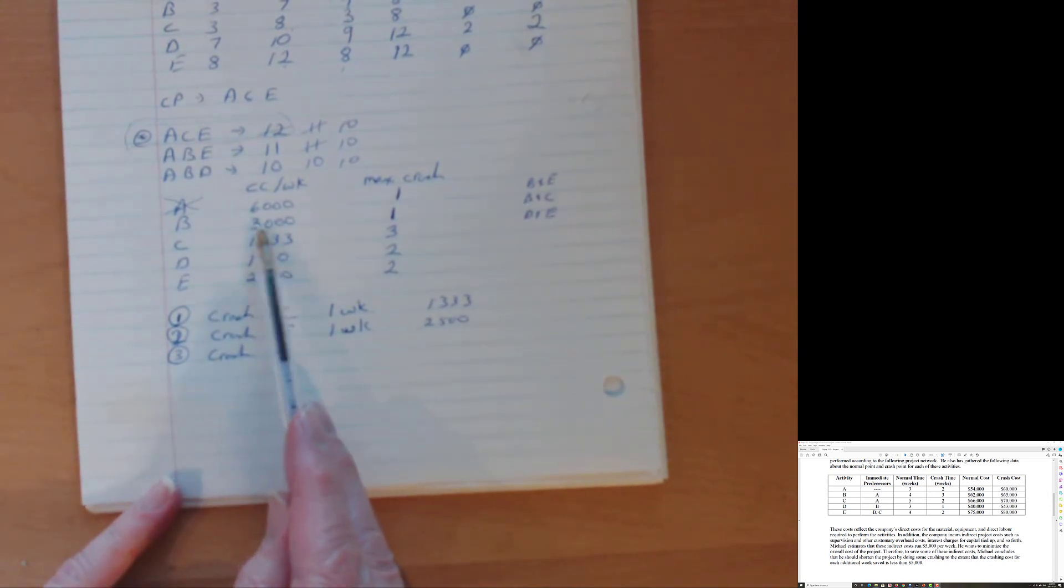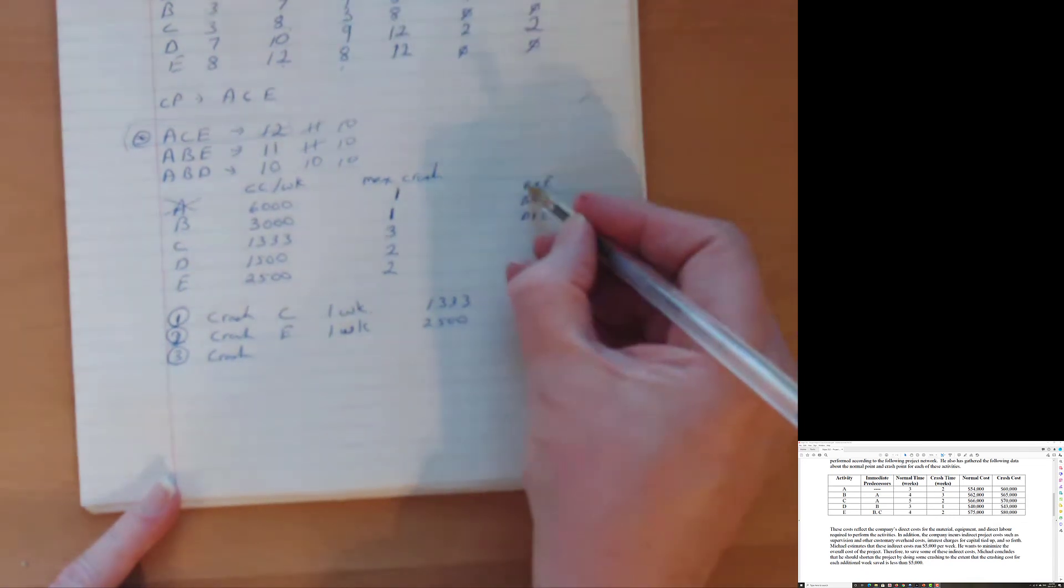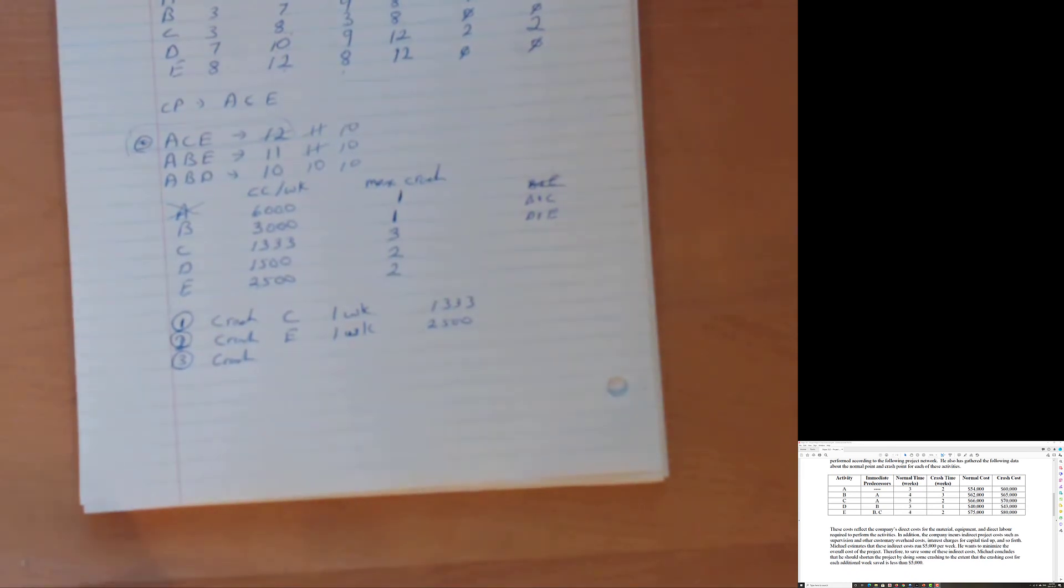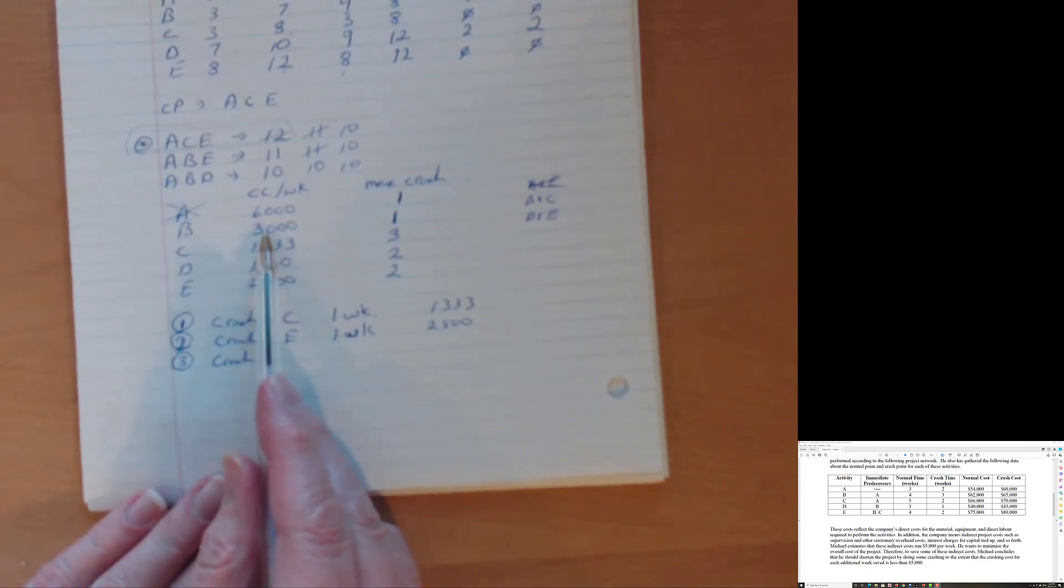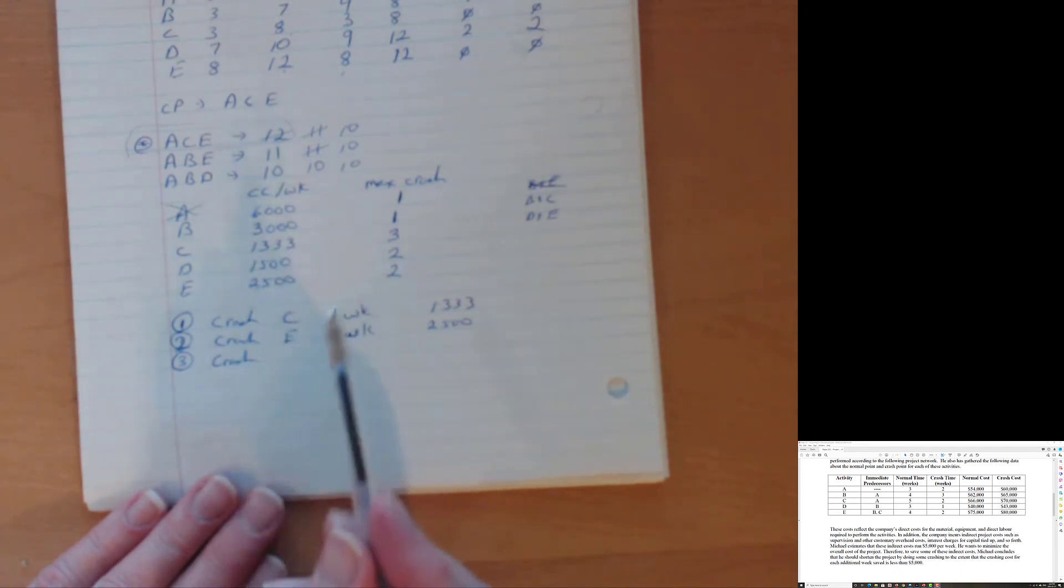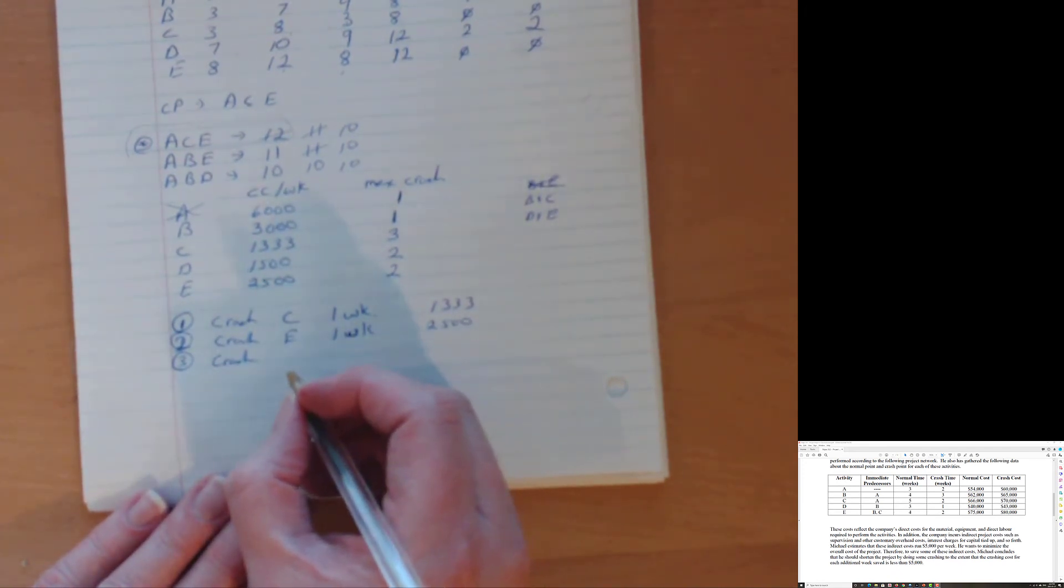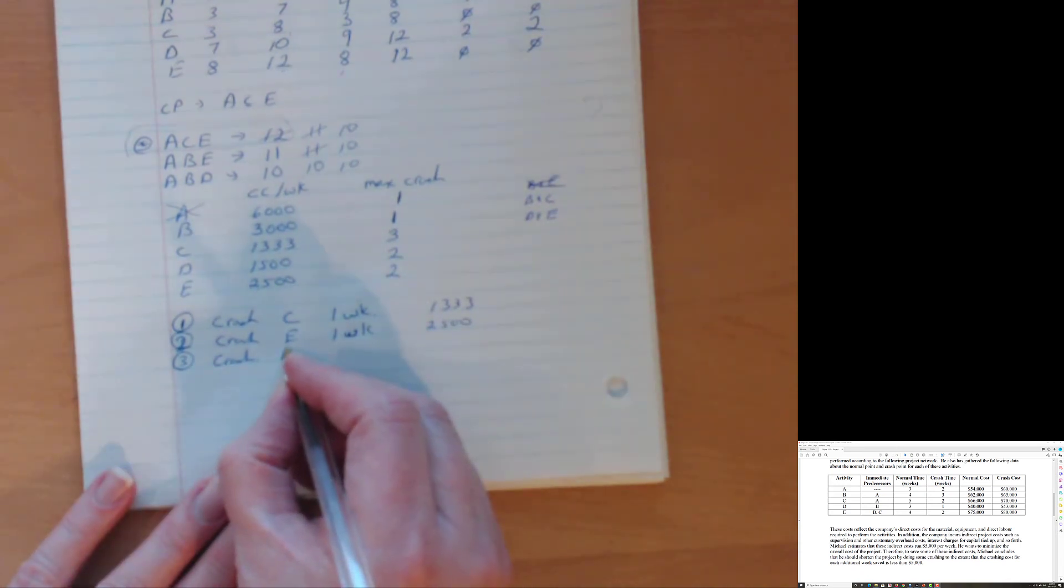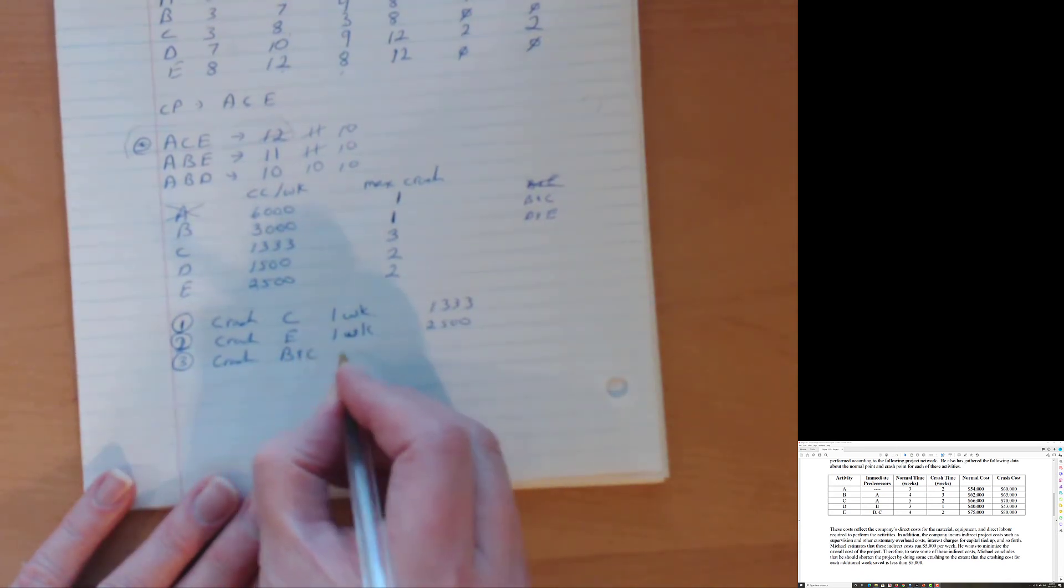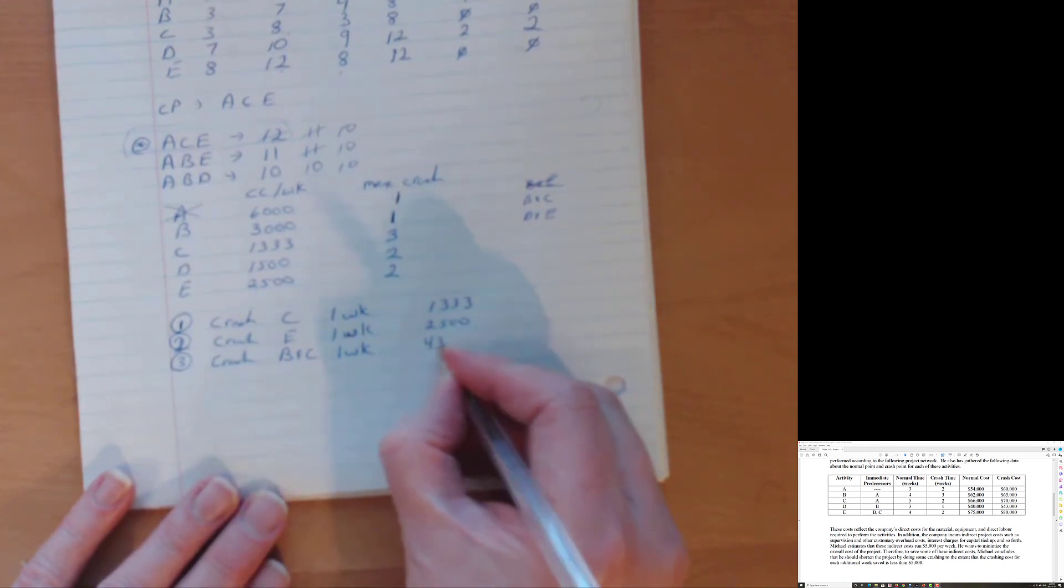Well, B and E is $3,000 plus $2,500. That's $5,500. I'm not spending $5,500 to save $5,000. So B and E, that's dead dust. That doesn't work so well. So let's go to the next one. Let's go B and C. So B is $3,000. C is $1,333. So that's good. That's $4,333. That's less than $5,000. I like that. So let's go with B and C. One week. That's going to cost me $4,333. Because although I'm crashing one week, I got to pay for both activities, but that works.